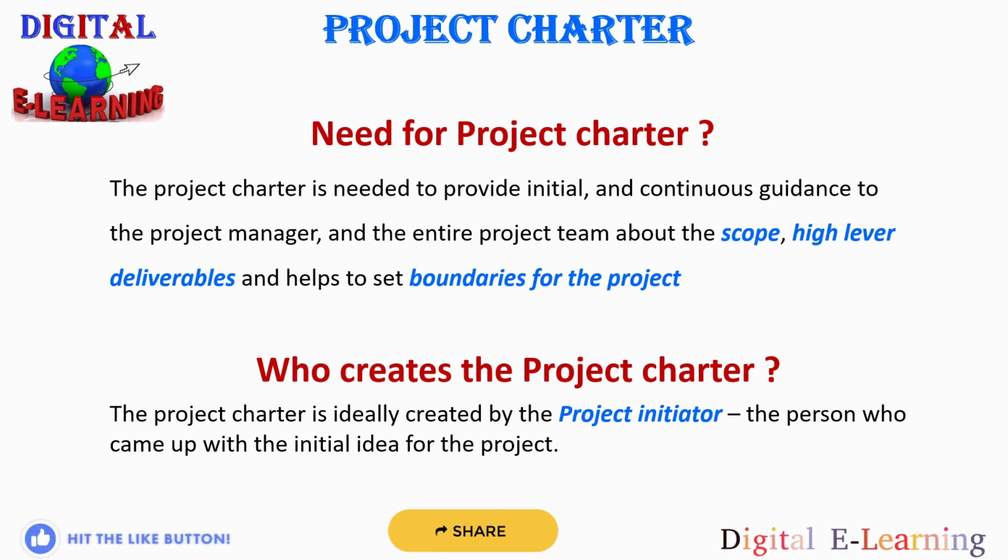The sponsor is the person who provides time, money and resources to the project manager to do the project, and most of the time the project sponsor will appoint a project manager to actually do the project and may even delegate the task of writing the project charter document to the newly appointed project manager.